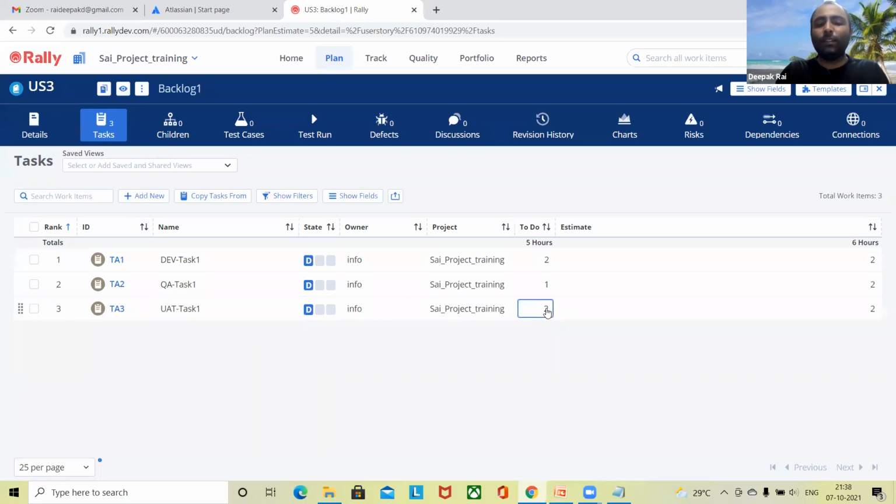Now you can see done and here 1. So you can calculate 2 and 2 is 4, and we still have 1 day left, which is required for the deployment or moving into production, which again requires some documents, approvals, everything will be there. So the product owner, Scrum Master or business analyst will take 1 day for the approval activity. It means we are completing this user story within the time frame.